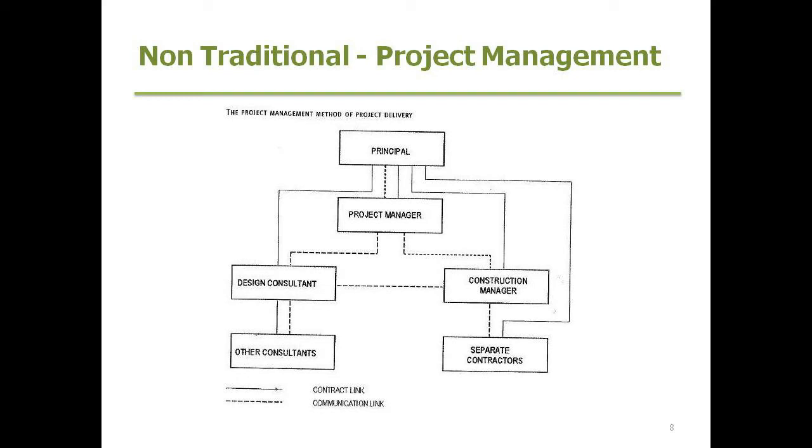The advantages I can see of this type of project, it's quite often used in large shopping centres where the project manager has a considerable amount of experience in large scale building delivery, and so there's a great benefit there for a shopping owner to actually get on with their business of retailing and let the project manager take full control of the building delivery process from inception to completion.